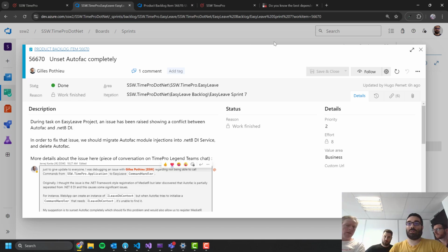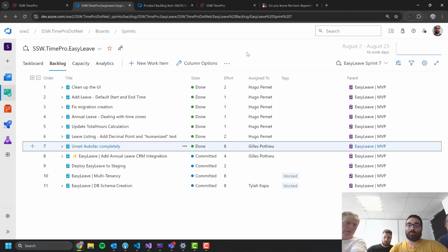Thank you. The only thing I would comment on, when you close that, please: during a sprint review, you only have to cover off what was done. The stuff that you got blocked on or you're still working on is optional. So you just say to the product owner, "Hey, do you want to see some of the extra stuff that we have not completed?"